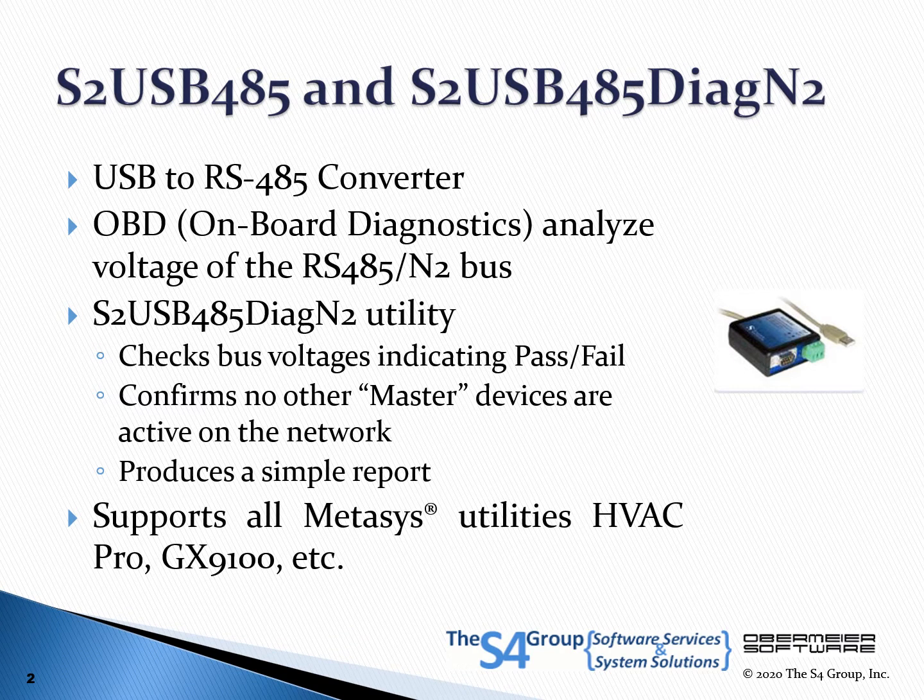We've said it before and we'll say it again. Investigate before you integrate. Following this advice is the best way to mitigate risk. Do your research up front. Confirm that the N2 bus is in spec and that all devices are operational before starting the integration process.